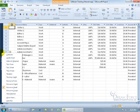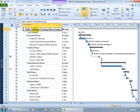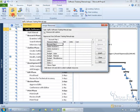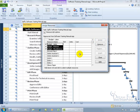Come over here, right-click on the view bar, go to the Gantt chart. Just like any other task that you want to assign a resource to, select the project summary task. Come up here, click on the resource tab, go to the assignments group, click on assign resources, then click and drag to select the three budget resources, then click assign. They're checked and we're done.